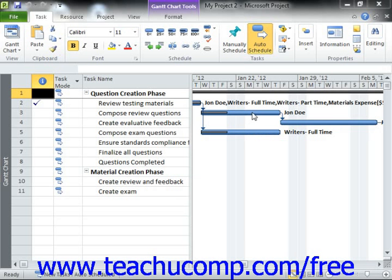Despite your best efforts in planning, there will inevitably be times when work on a task will be interrupted. This may be due to an unplanned event or even a task reprioritization. Either way, you can interrupt work on a task by using the Split Task function within Microsoft Project. This feature allows you to split or interrupt a task in order to accommodate planned and unplanned breaks in the work on the task.